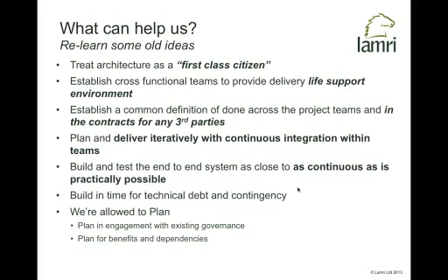Something we can do as well is think in terms of, inevitably we'll build up technical debt, stuff that we've just got to fix and change through the life of the project. And so sometimes it's worth, especially in a large project, planning some time for technical debt, because we know it's going to happen. Having some time in there to actually deal with that can be quite helpful.